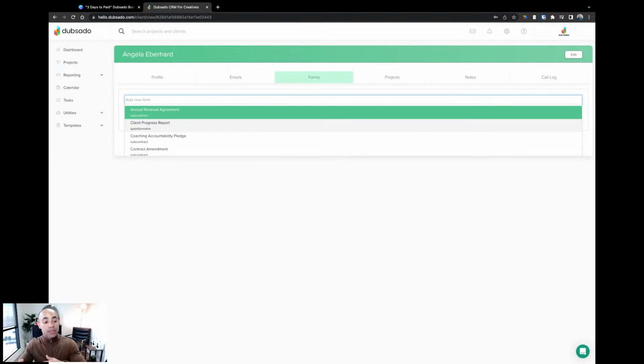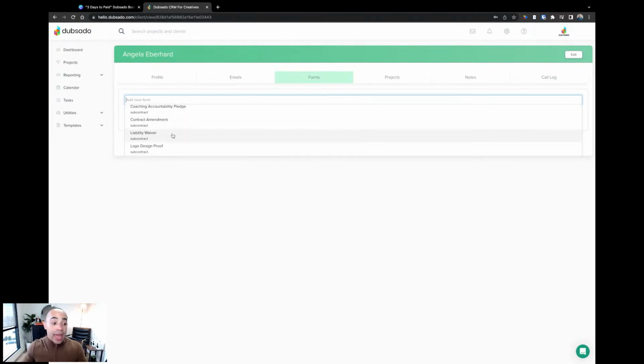Those are for projects. But technically, you can send forms from the address book if it's a sub-agreement or a questionnaire. So what I usually like to do with contractors, vendors, and things like that, I'll create, let's say, a vendor sub-agreement, and I can just send it through the address book. And now the client can't see it because it's just sent to this contractor directly.